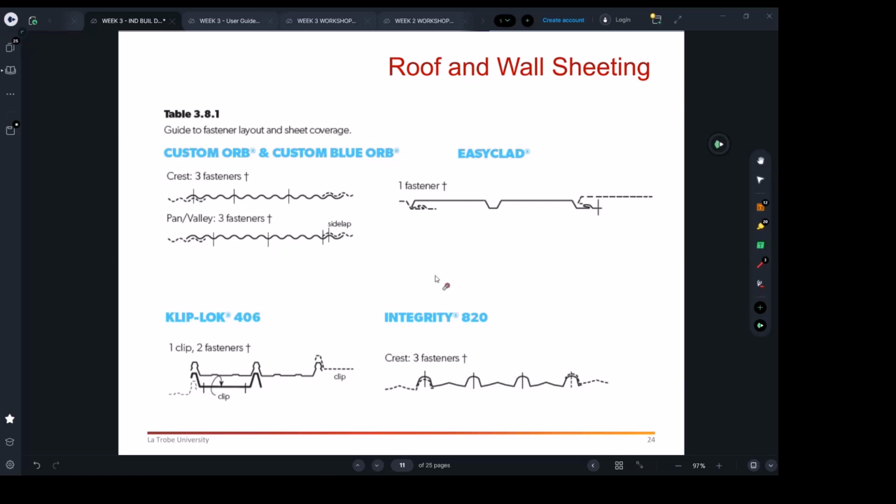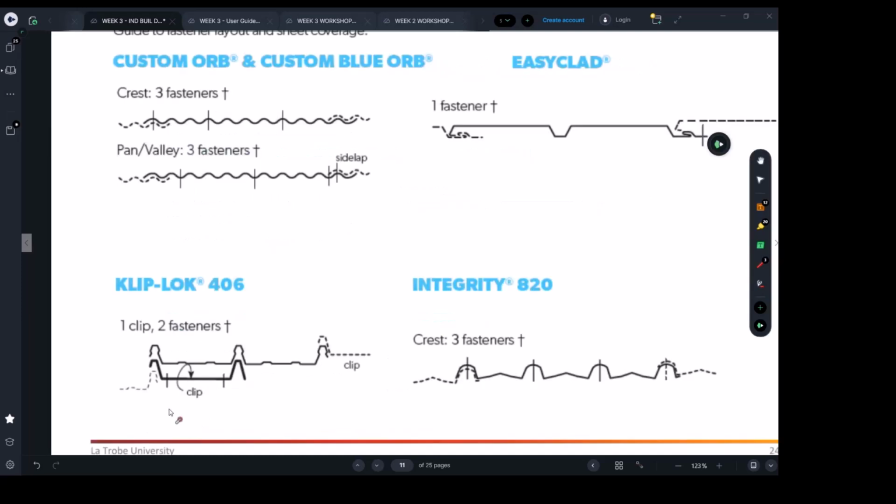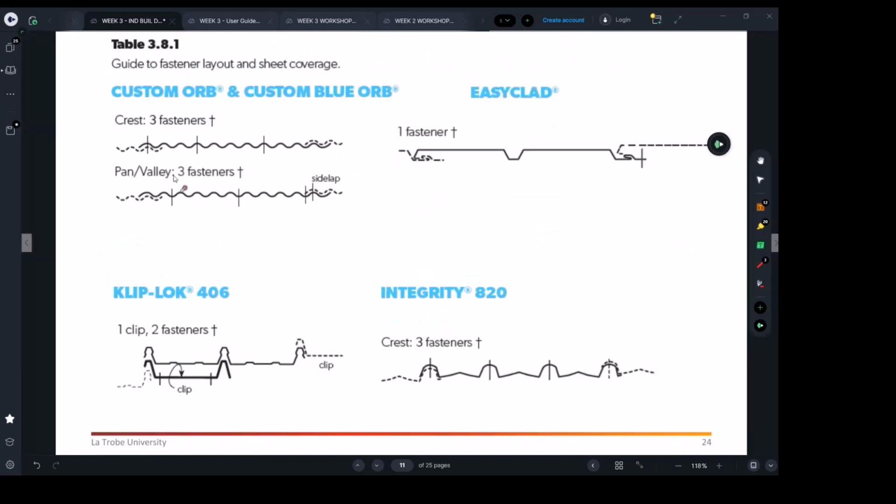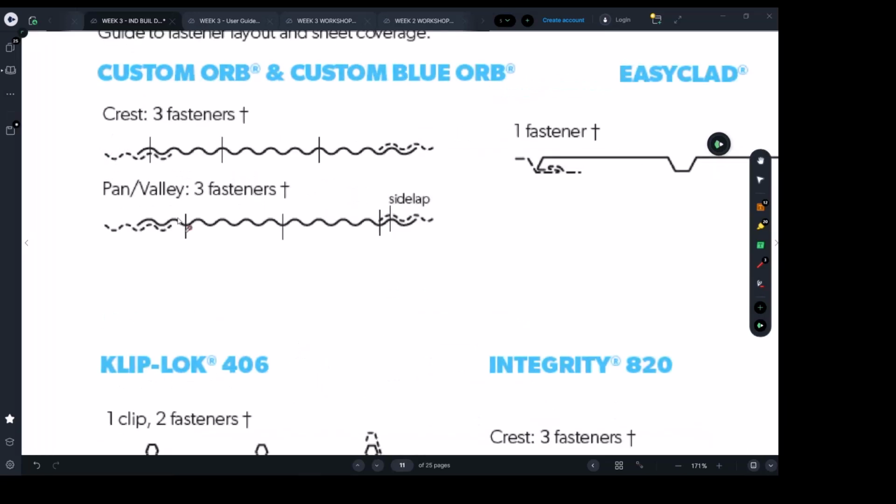There are a lot of people who are not insured that can get this done, but the price is going to change. That means you have to control it. You have to control the quality of placement and read the documents. As I said, the sheets have to be lapped together, as you can see, and then the fixing has to be done as per their advice.